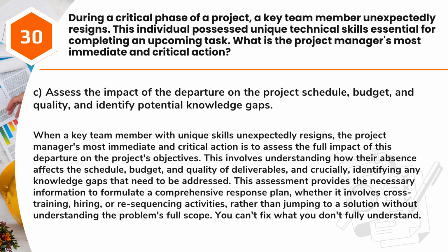This assessment provides the necessary information to formulate a comprehensive response plan, whether it involves cross-training, hiring, or resequencing activities, rather than jumping to a solution without understanding the problem's full scope. You can't fix what you don't fully understand.